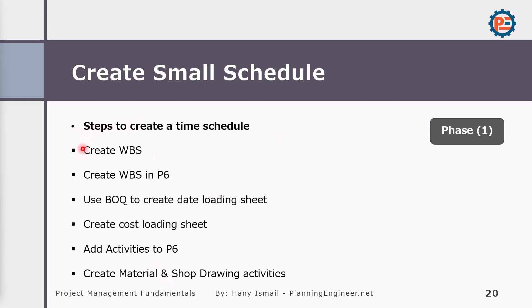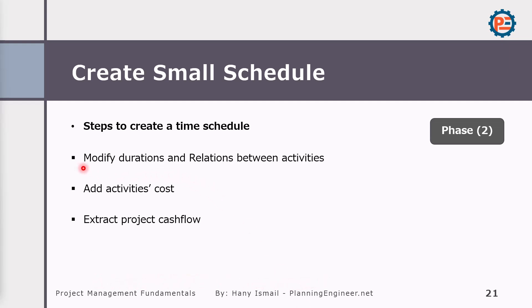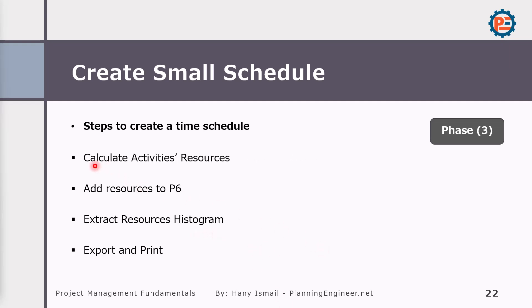In order to create time schedule, we will create WBS. We can start doing it outside Primavera. Why? Because we might need to discuss with the project team how we are going to decompose our project. We are going to use phases. We are going to use areas which buildings will start first. So this will impact how you are going to organize your project under WBS. I'm going to tell you more information about WBS in a minute. But once we agreed about the WBS we would like to use, then we will create it in Primavera. Then you will use BOQ to create data loading sheet, then create the cost loading sheet, add the activities to Primavera, then create material and shop drawing activities. Once we created this one, then we can start modifying the durations and relationships between activities, add cost and extract the project cash flow. We still missing one step is to calculate the activity resources, add resources to Primavera P6, then we can extract resources histograms and export and print.